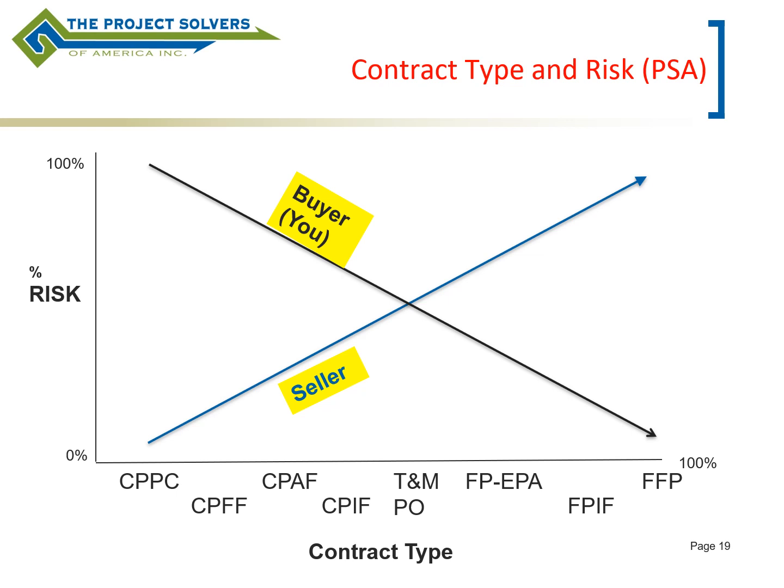So starting right with the neutral, let's start there. If we were to pick a T&M contract, which is a time and materials contract, or a purchase order, it would be considered risk neutral for both parties. So it doesn't benefit the buyer or the seller any one way or another.